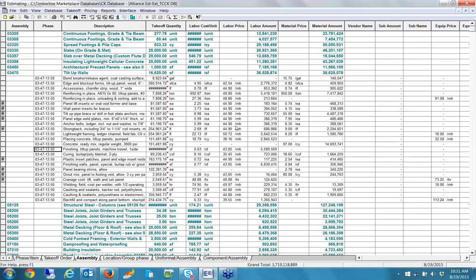So it retains that questionnaire. So now I can go into that questionnaire and change the footprint, change the perimeter, go with a different skin of the building. And as I make those adjustments, now I have two estimates based on budget 1 and budget 2. Well, what that does is if you're using the copy estimate command and making those adjustments along the way for your different budget iterations, it really sets the stage now for being able to come in here.